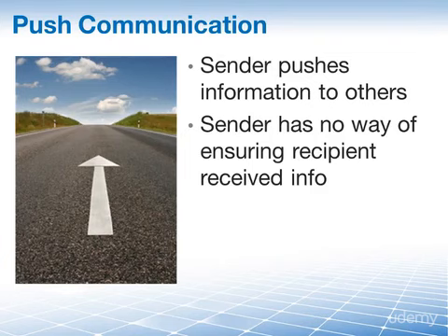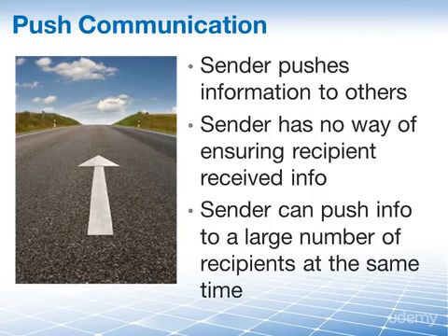The advantage, of course, is the sender can push the information to a large number of recipients at the same time. And in regards to common uses, we're talking here about status reports, voicemails, podcasts, emails, press releases, letters, faxes, really anything that you as a single sender can send to one or multiple recipients, multiple stakeholders at the same time.